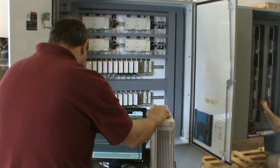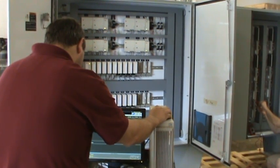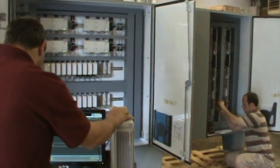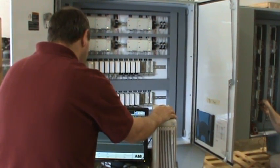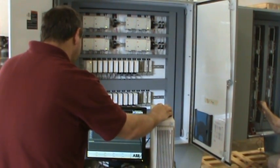Charles drives an output and James confirms he's got it. The physical test verifies that the I/O configuration is correct — it verifies the proper wiring for the output card and wiring all the way to the terminal strip at the right voltage.